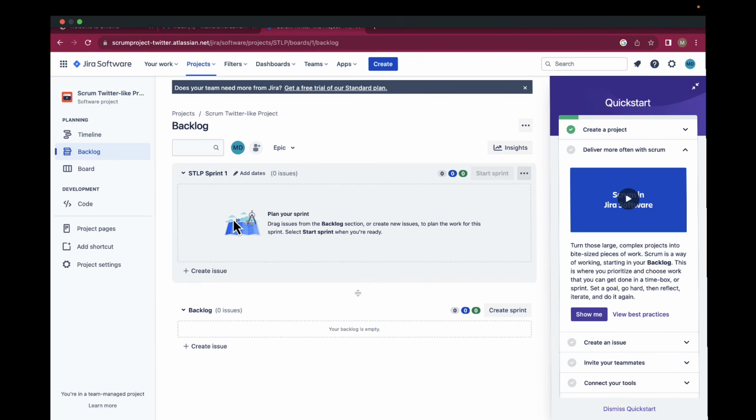And then a task basically is a unit of work that needs to be completed as part of the project. In terms of agile development, tasks are often smaller chunks of work that make up a user story. For example, a user story might be, as a user, I want to sign up for a new account. The tasks related to this user story could be design sign-up page, develop back-end sign-up logic, test sign-up processes. So these are the ways of writing tasks and user stories as well.